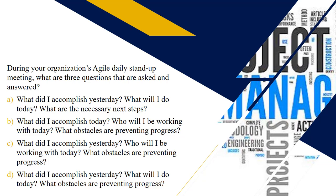Now we're going to talk a little about Agile. During your organization's Agile daily stand-up meeting, what are the three questions that are asked and answered? After looking at all of the options, you should have selected the last one, choice D. The three questions asked and answered are: what did I accomplish yesterday? What will I do today? And what obstacles are preventing progress? These are the three questions asked during the stand-up or scrum meetings.